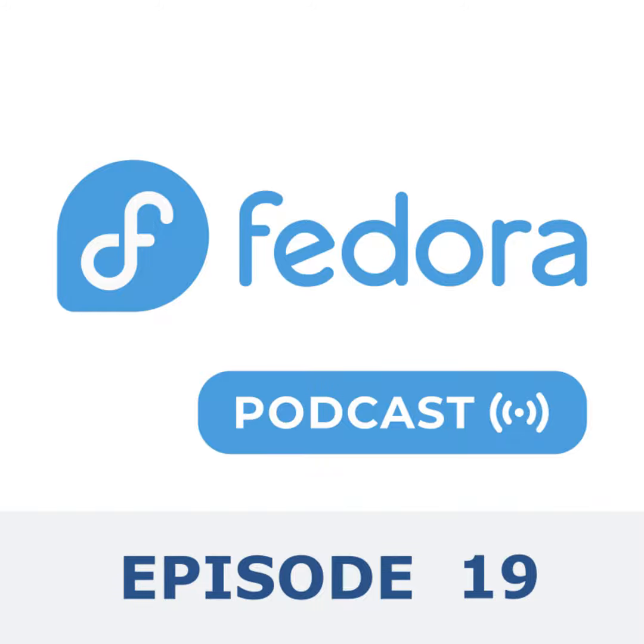Not really. That's one of the things that I would really love to do more of in the future. Fedora is downstream of a lot of really big projects like GNOME, KDE, the Linux kernel, stuff like that. And I would love to have more interaction with the major upstream pieces, mostly in sort of a listen-in mode. But if there's a significant delay in the GNOME schedule, then that's going to severely impact Fedora Workstation. And they're also on a 6-month release cycle that basically leads ours by a short amount of time. So GNOME release comes out, and a few weeks later, it's packaged in Fedora, and we're getting ready to do the release. So having more coordination between some of our bigger upstreams would be great.